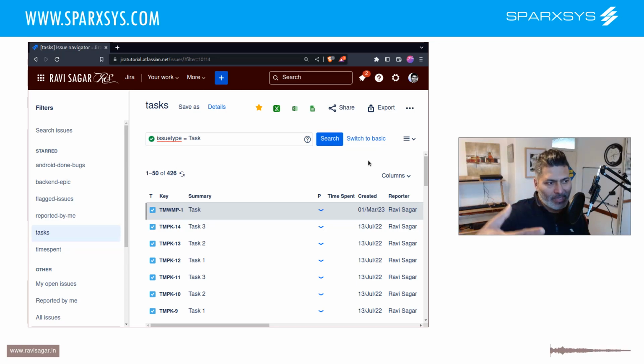So have a role-based approach and let your project managers add people to that particular project, because when you have default private permissions on the project, as a Jira admin, you would do less work, and you will of course be assured that by default everything is private. And if someone needs to share something with someone, if they need to add people to those projects, they can do that, right? But of course, also keep one more permission scheme for open, not really for everyone, but for any project using that particular permission scheme.